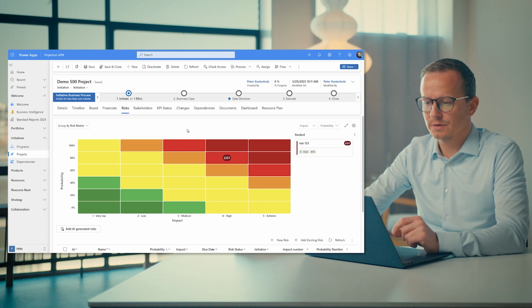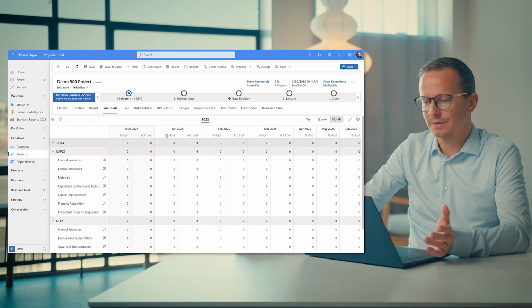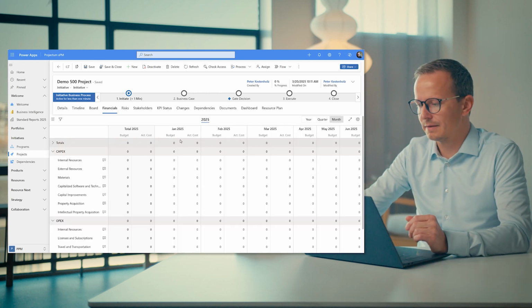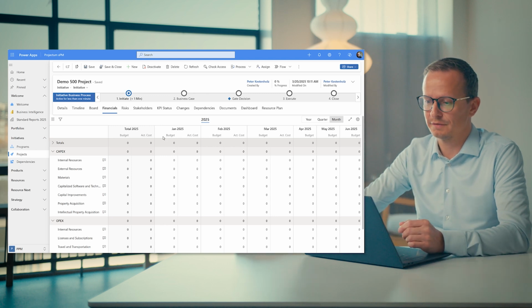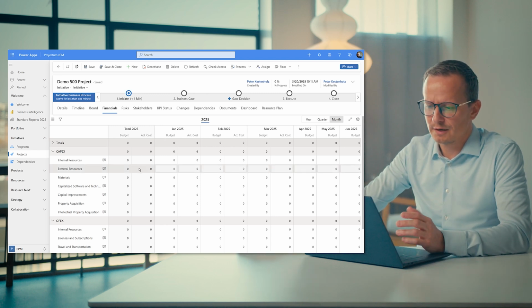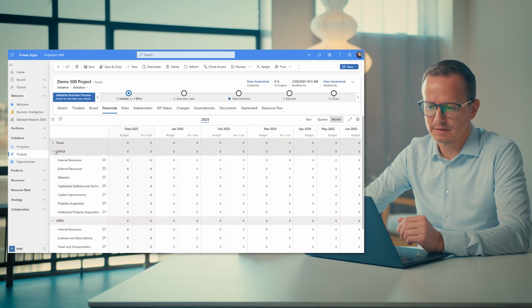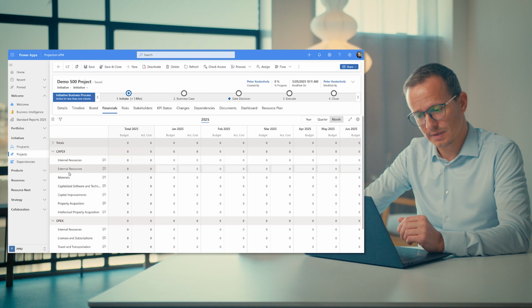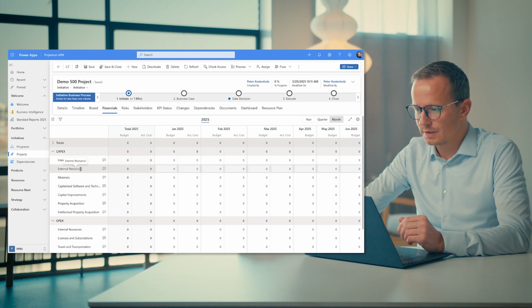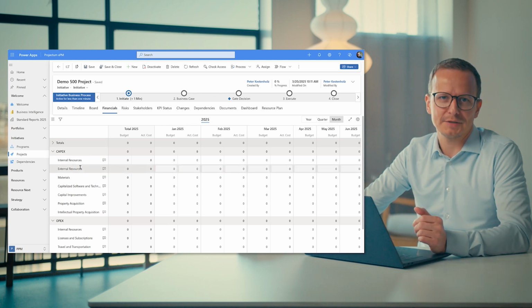Beyond this, we can also go to the financials. And of course, as a project manager, we need to somehow establish a budget, either a resource budget, but then also a financial budget most often, or quite often. So right now we have a financial grid that can be very long like this, with categorizations of CapEx and OpEx, and also detailed cost categories below CapEx. It's all up to the administrators of this tool to establish what should be the approach when it comes to managing our financials.